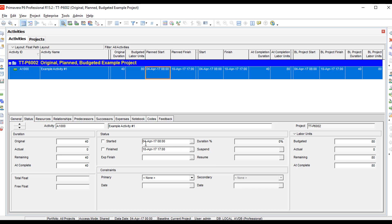Notice how when I deprogress the task by taking the started checkbox off, my remaining and at complete went back to 40, and my remaining and at complete on the labor units also went back to 40. This has to do with some schedule settings that are on by default which link the two together. You can turn these schedule settings off, but we do not recommend doing that.